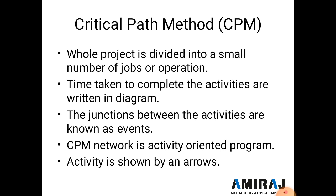Some activities are independent of each other, like electrical fitting and plumbing — both are different and not dependent on each other, so both can start in parallel at the same time. In CPM, all jobs or operations are either dependent or independent, and the time to complete each activity is written on the diagram.